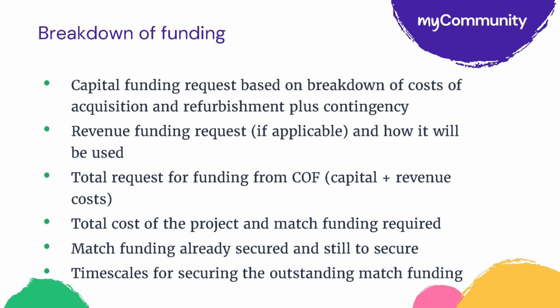And as Zoe said before, the really important thing is that you're showing when that match funding is likely to be available. You don't have to have secured all the match funding before you apply, but you do need to be showing that you've identified 4 or 5 funds, you've had discussions with those funds, and that it will be going to committee at a certain time, for example, or that you have an in-principle offer from a loan funding provider or something like that.